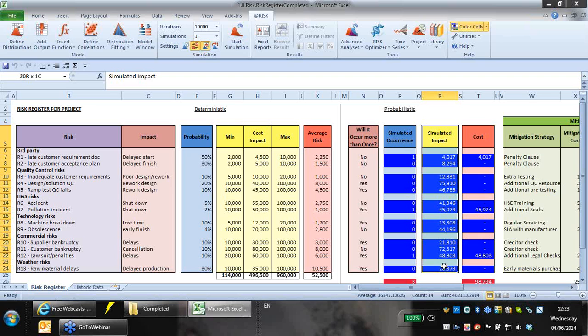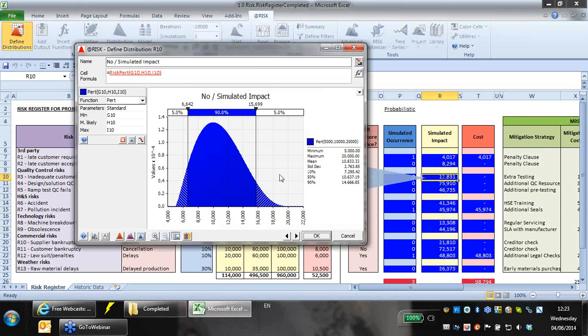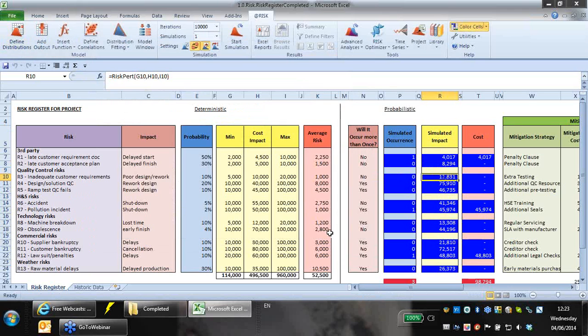So for the impact, the severity, we've just got distributions, just as I had for my last model, continuous distributions to show the uncertainty around the actual impact. What we're doing with these discrete distributions is simulating whether or not these events occur. In this column P, when I'm pressing F9, I'm generating lots of 1s and 0s, driven by the choice of distribution, which in this case is a Bernoulli distribution. Binomials are the same kind of idea.